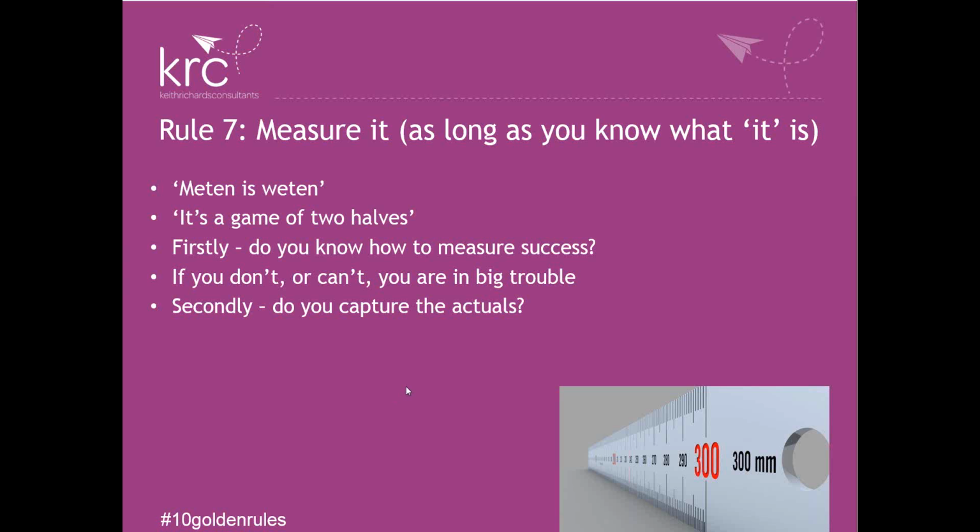So how long did it take? Certainly from my experience, I would suggest 85% of the people I deal with do planning, do estimation, and they don't really have time to capture those actuals. Now this isn't a small point. If you can capture those actuals, you suddenly become predictable, and you suddenly get to know a little bit more about what you're doing.